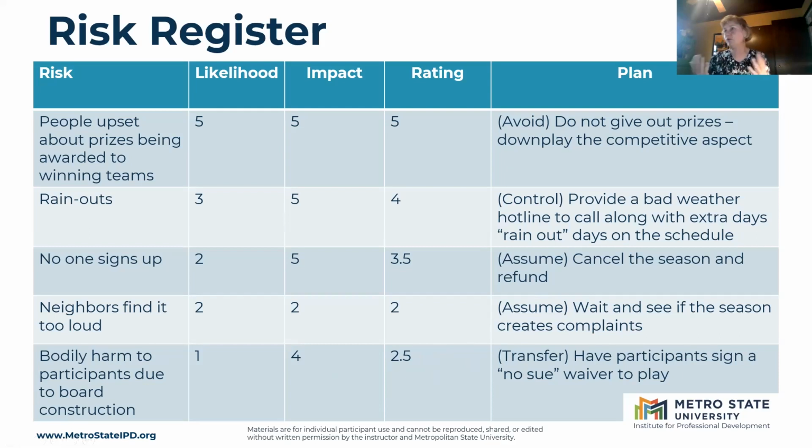I called it a no-sue waiver. I think it has a more technical name than that, but anyway, that's true. So play at your own risk, basically. And now that risk is no longer our problem because we've transferred it to somebody else.